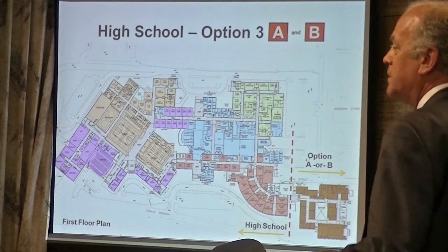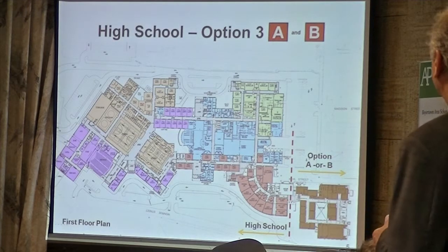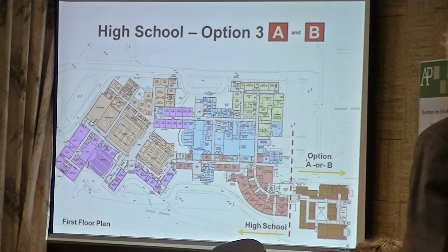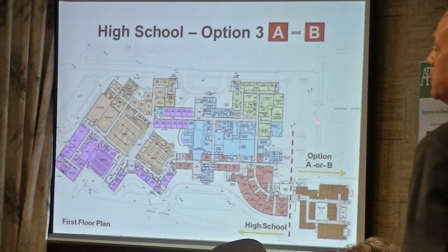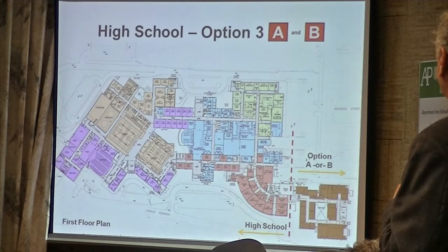And as part of the LEED submission to the USGBC, we have actually had to delineate a site plan, which is actually the LEED site for the project. And we have to put an imaginary line through here where this dotted line is, and say that this is the LEED site and the LEED building, and this portion of the site is not part of the LEED boundary or a LEED building for the submission to the USGBC, and therefore we can't share utilities.